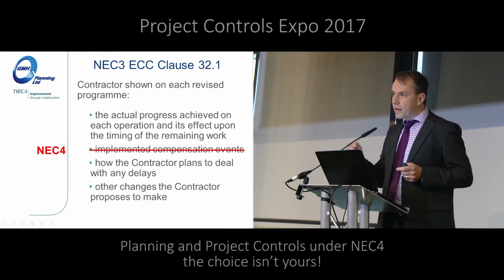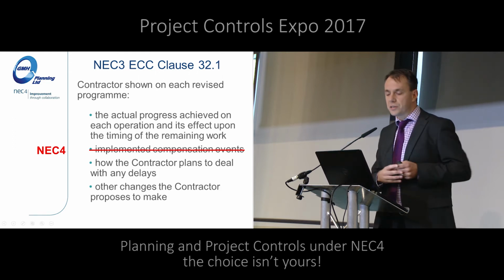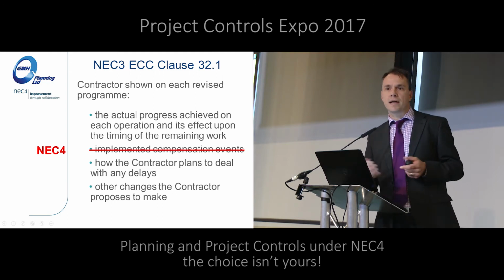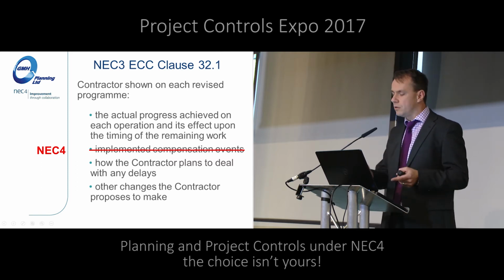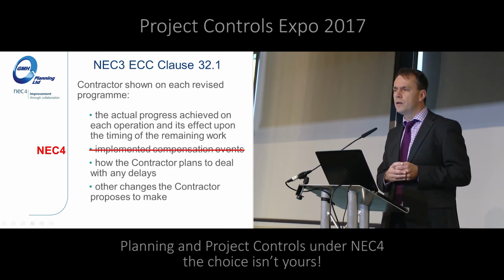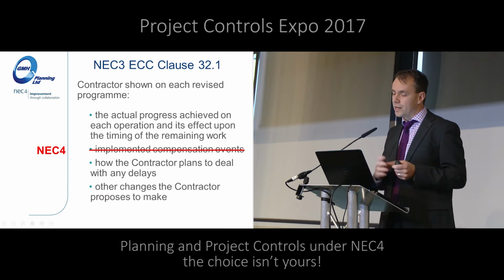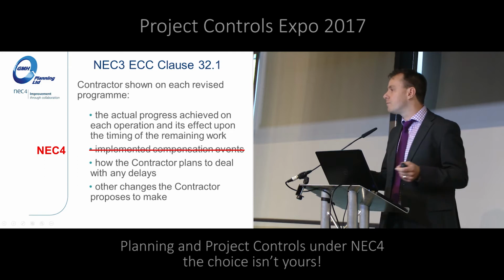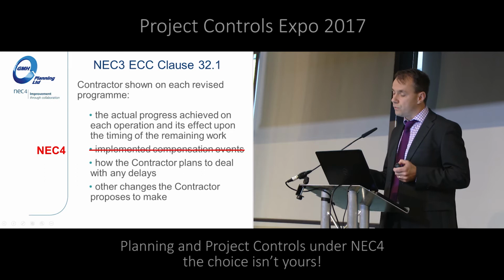Now, I'm actually okay with that, because I understand that, well, the first line means you've got to show progress, so you've got to show non-implemented compensation events on the programme if they're impacting the works. So to me, that's not an issue, but I do fear some people might say, well, we can't show implemented compensation events on the programme anymore. That's not the case. So again, with a bit of guidance, a bit of education, you'll understand why they've made that change. Should you show non-implemented compensation events? You have to. The only difference is it can't affect completion date yet. It can only move plan completion.